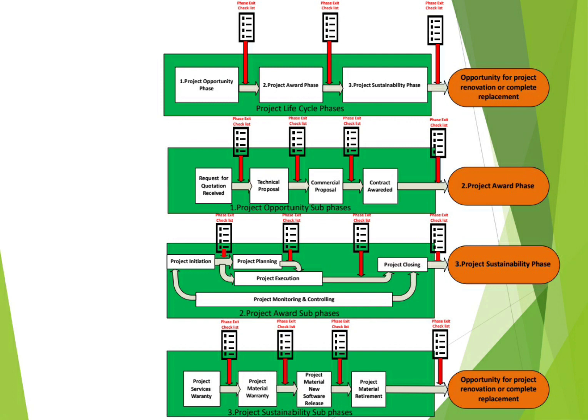Also, for the phase exit, you need to ensure that your project is booked in your system and it is active. Also, you will be having the agreed dates of the bank guarantee, the validity of the advance bank guarantee, and the validity of the performance bank guarantee as discussed with your customer. All of this should be in the phase exit checklist.